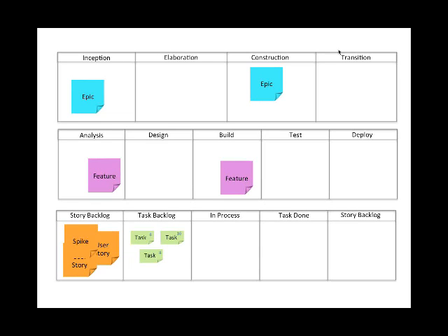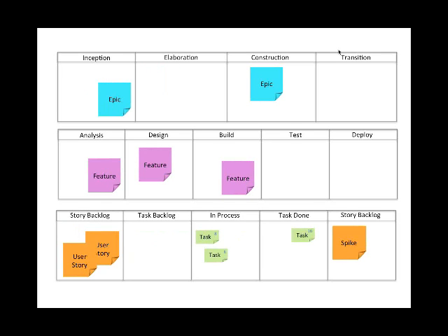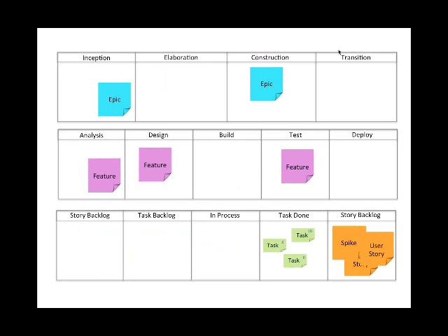There's all kinds of different things that we can have down at the Scrum level, and their backlogs are being coordinated and throttled by these two higher level constructs. So you see what happens is, if you guys are familiar with Kanban, we put work and process limits across the top of some of these columns that forces us to pull things across the board and enables us to very visually see when things are blocked.